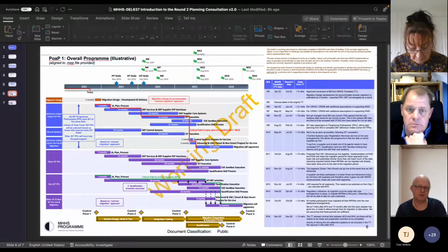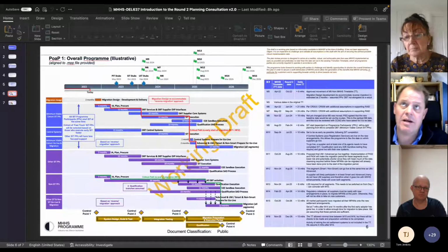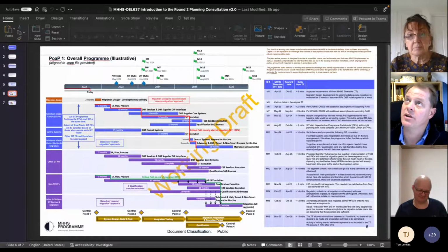We built contingencies into certain parts of the plan where we've created gaps between activities that allow for some wriggle room. So we built in contingency that way. Yeah, there's a difference between program contingency and individual party contingency, of course. Indeed, absolutely. I was going to make a reflection there, Alex, hopefully not to get shot down by my learned colleagues.